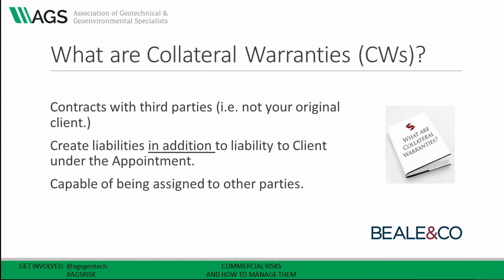Collateral warranties create new liability in addition to your liability to the original client. So if your limited liability under your appointment is £1 million and you agree to mirror that in the collateral warranty, your total potential liability increases to £2 million. That's another reason why it's important to set a reasonable limit in your appointment in the first place. As it's a contract in its own right, the third party beneficiary can also assign the benefit of that contract to others, meaning you need to include the same safeguards within the collateral warranty as you have in your original appointment.